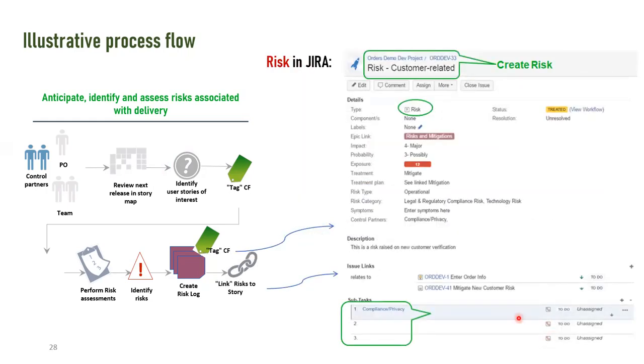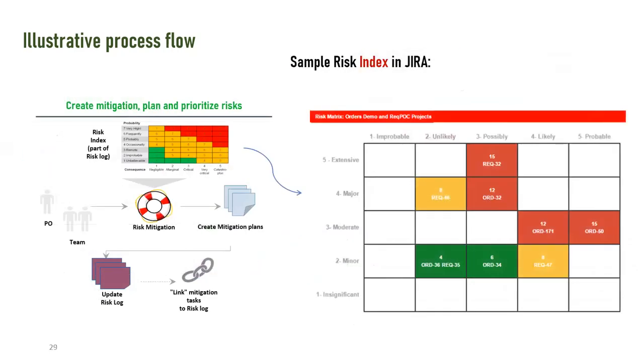And basically, we could actually create from that risk issue types that we created and that we broke down into, as you can see here, tasks, right? So now basically the compliance and the risk folks, their work is documented and estimated, and is just as important a part of the workflow for the entire team. They have become supporting team members for however many iterations they are specifically assigned.